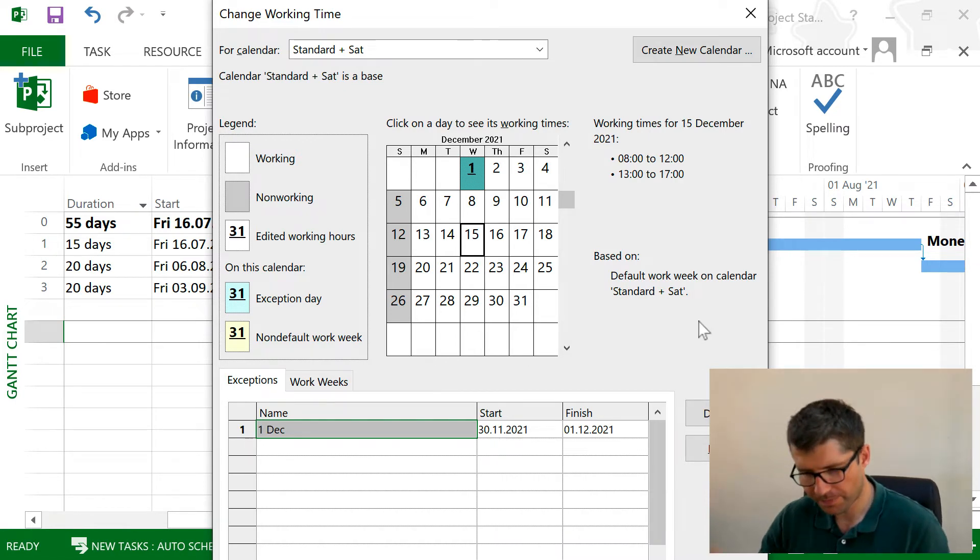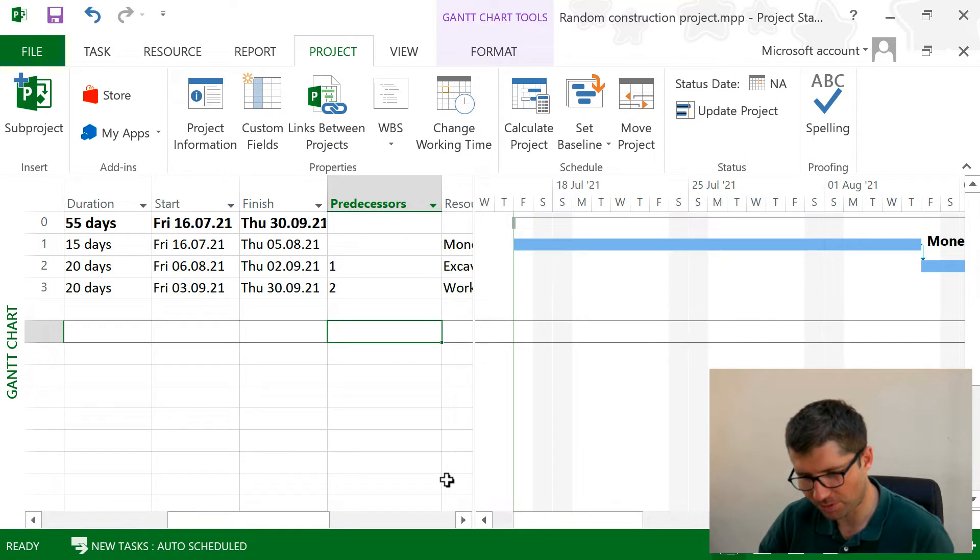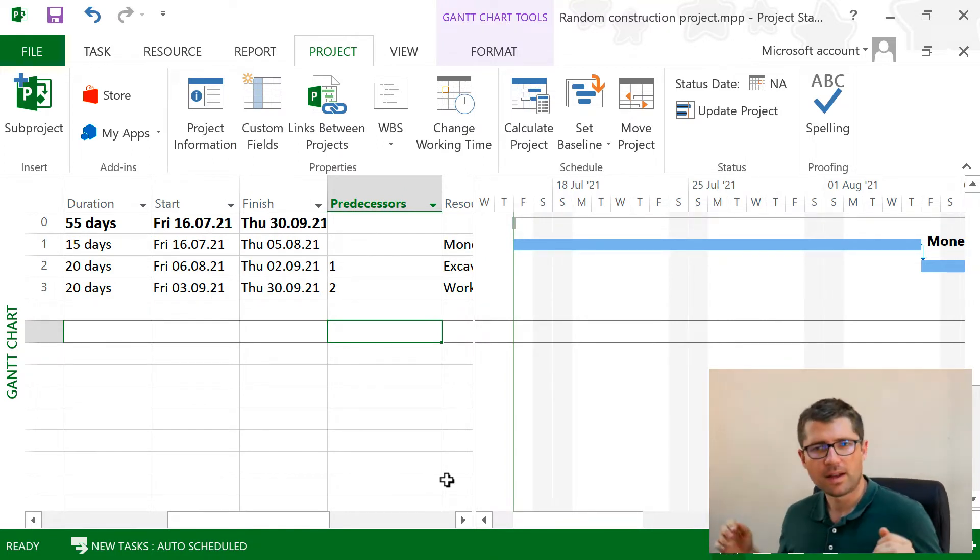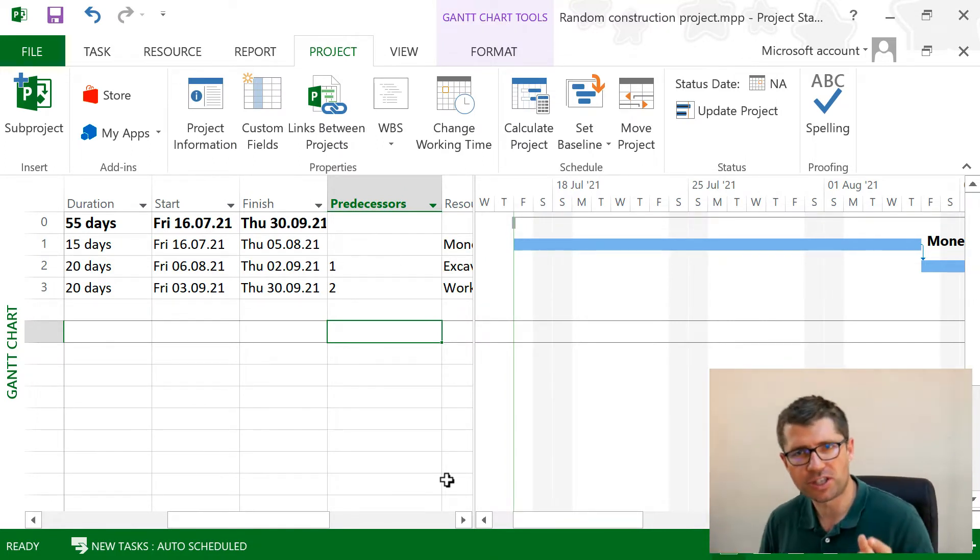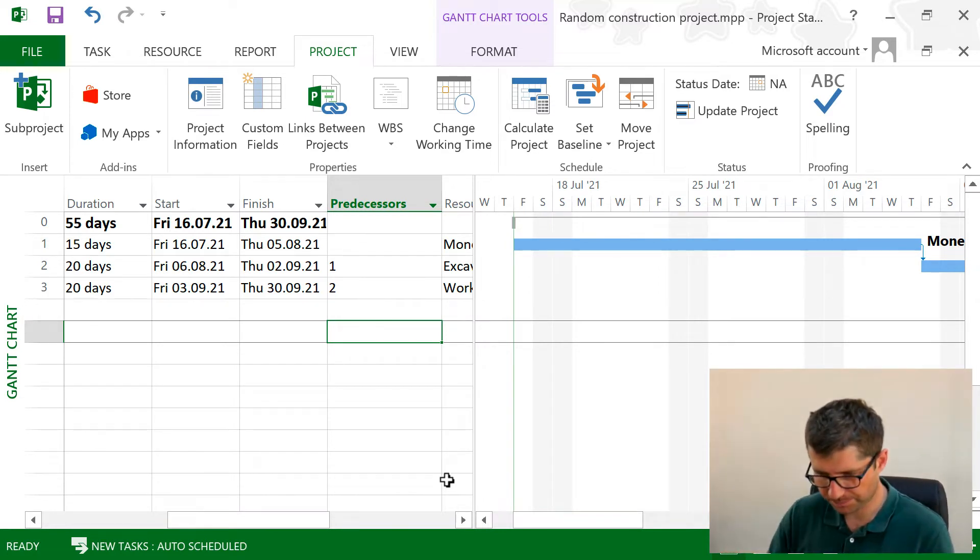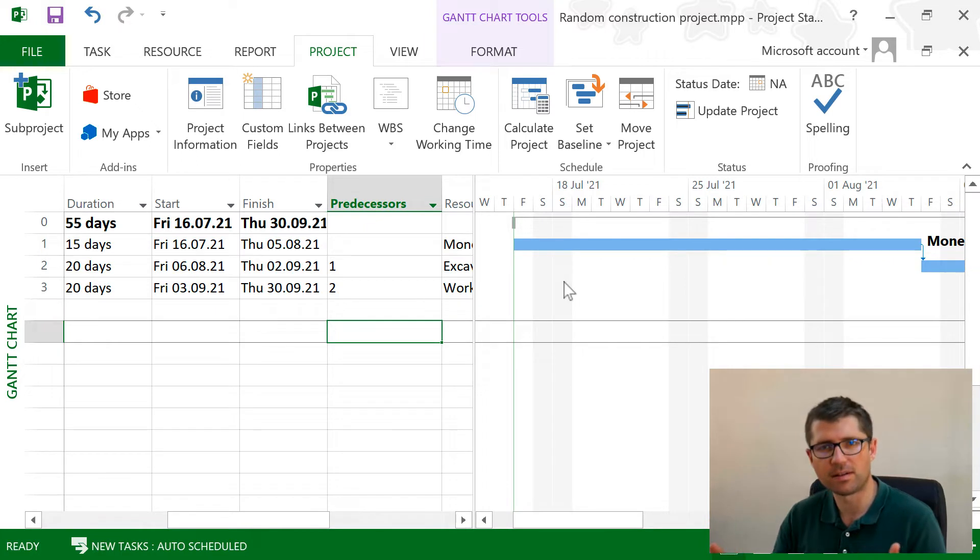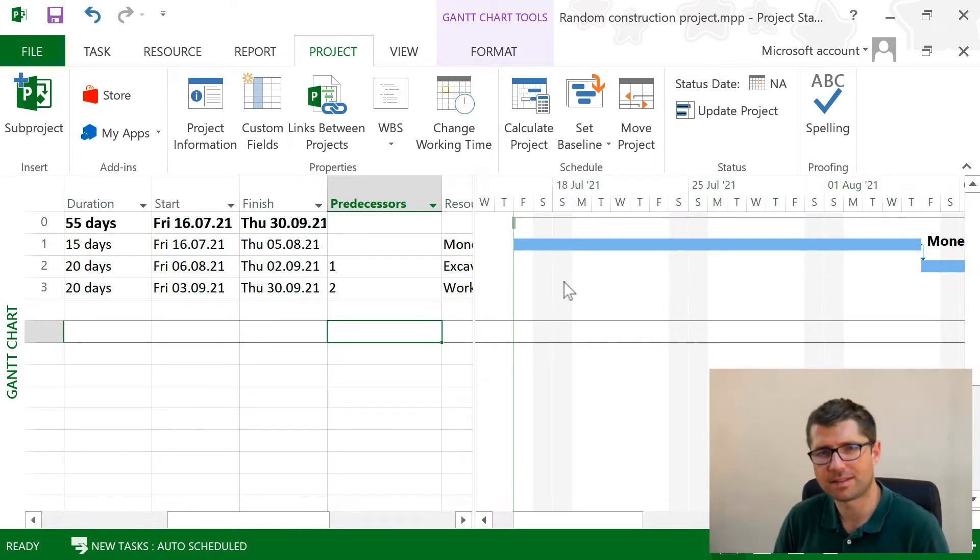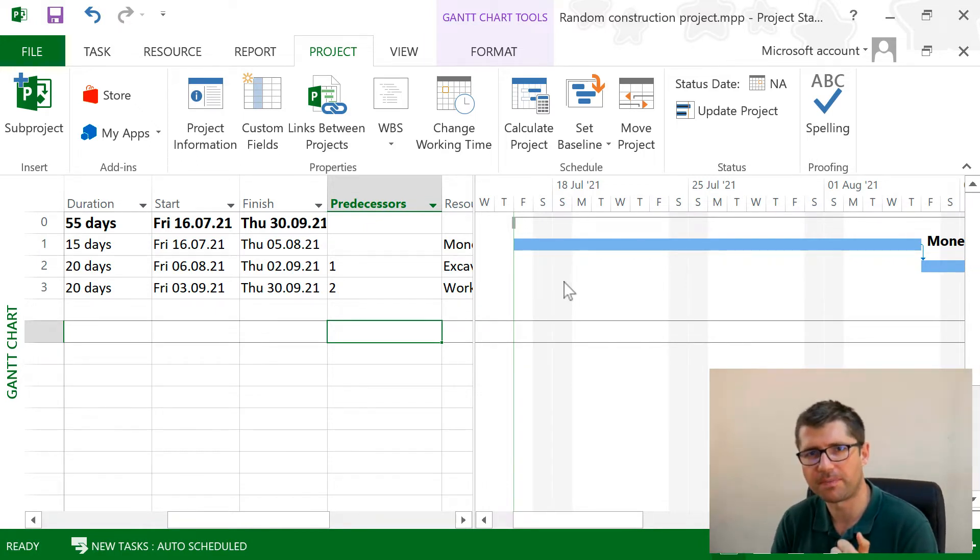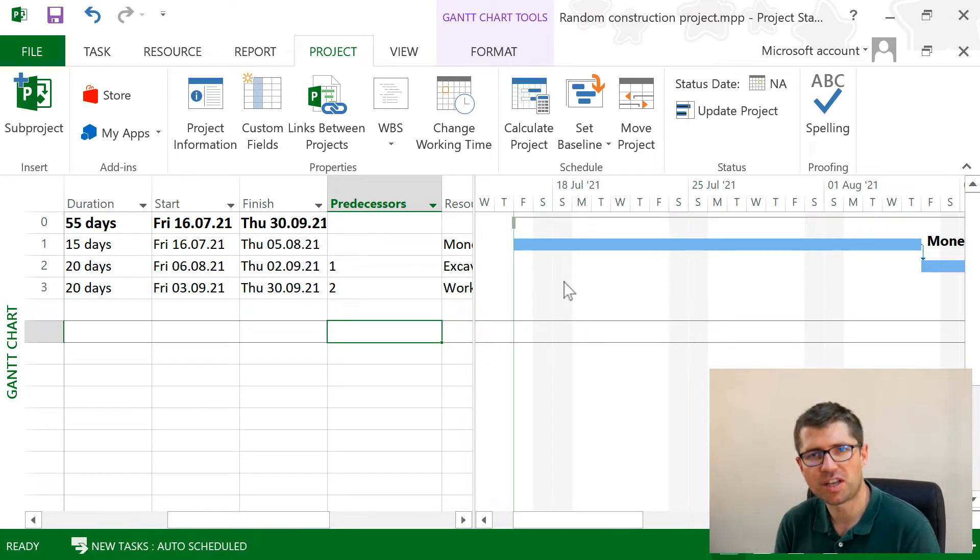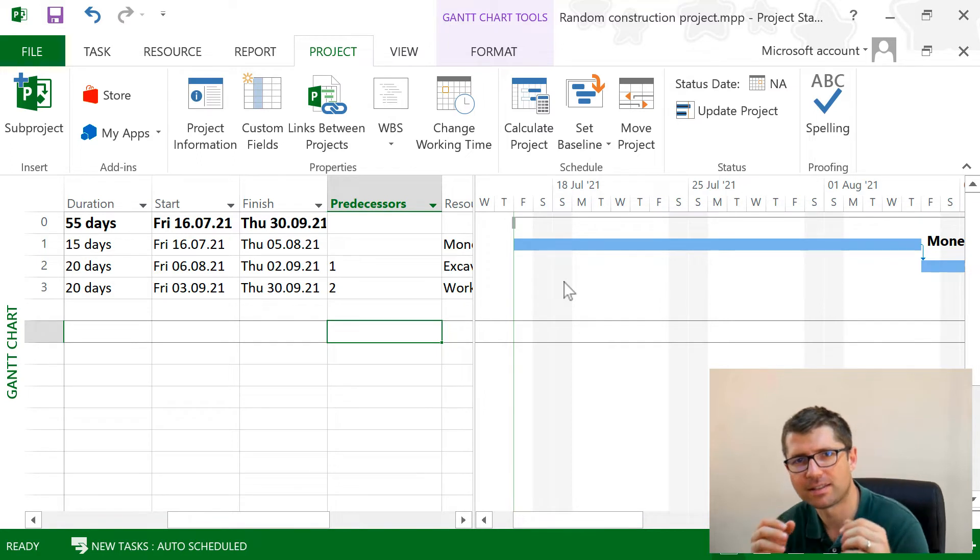Now if I click OK, I'm trying to click OK. It's pretty hard because I can no longer see the OK button, but I clicked Enter so it's the same thing. I will see that nothing changes. If I look at the Gantt, this will show me still that Saturday is a day off, not a working day. That is because I still haven't changed the project calendar. I created it, but I haven't set this calendar as a default for this project.